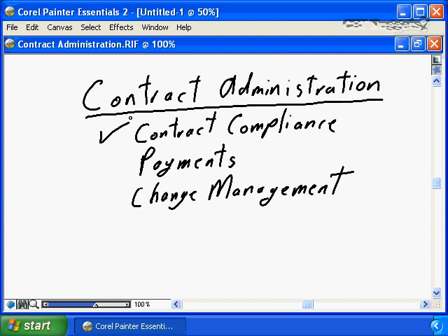But because the customer suddenly wanted to terminate the contract, they found this clause in the legalese in the contract that said we're in violation, and therefore they had rights to terminate with cause. Why did they want to terminate with cause? A, they could terminate with no penalties, no recourse. But B, the business condition had changed. The company wanted to cancel the project. The company no longer needed the project results because the business environment had changed, and therefore they went looking for reasons to terminate with cause.